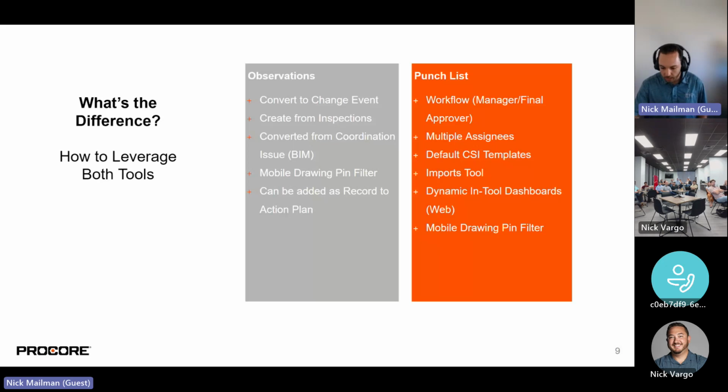So Nick Vargo, I'm going to lean on you a bit. Can you talk to me about your punch list process? Do you have different types of punch list items and the overall workflow? Yeah, absolutely. We do set up templates so that we can go more quickly. Does anyone else use templates in the punch tool? You can very quickly set up default assignees or default punch item managers and so forth. So we definitely leverage that and set it up on a project by project basis, just to simplify the whole process.